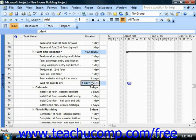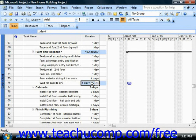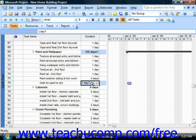Now note that although this is a critical step, it's also a passive step and requires no active work. In this case, you could enter the task as an elapsed duration task, that is, one that simply occurs regardless of the working schedule. To enter an elapsed time duration for a task, you simply enter the abbreviation E before the time abbreviation used.